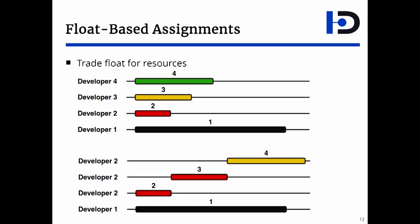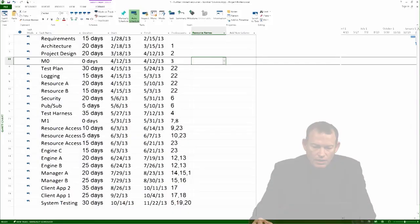So, again, note, I assigned the resource to the activity with the lowest float first, always. And I also traded float for resources. This is the essence of float-based assignment. In the demo, I will take the normal solution from Chapter 11, and I will show you how to staff it using float.